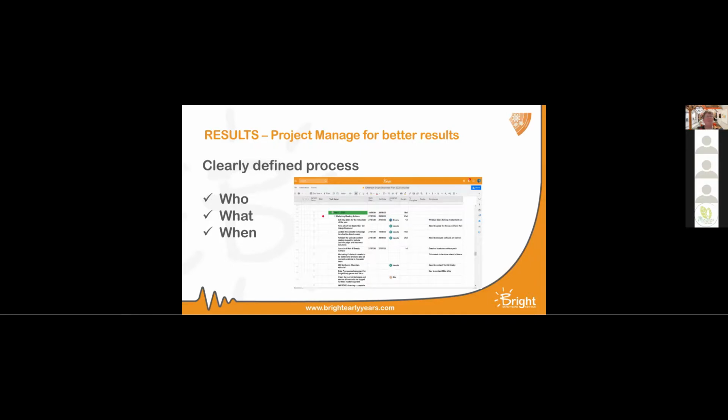When we put in Funding Loop, we did it at a slow pace. We did one local authority at a time. We were in 3, rather than trying to do everything all together. The first one took us probably 3 or 4 months before we got it to where we needed it to be, because we were having to do lots of internal tweaks on our nursery management software to get those integrations right.